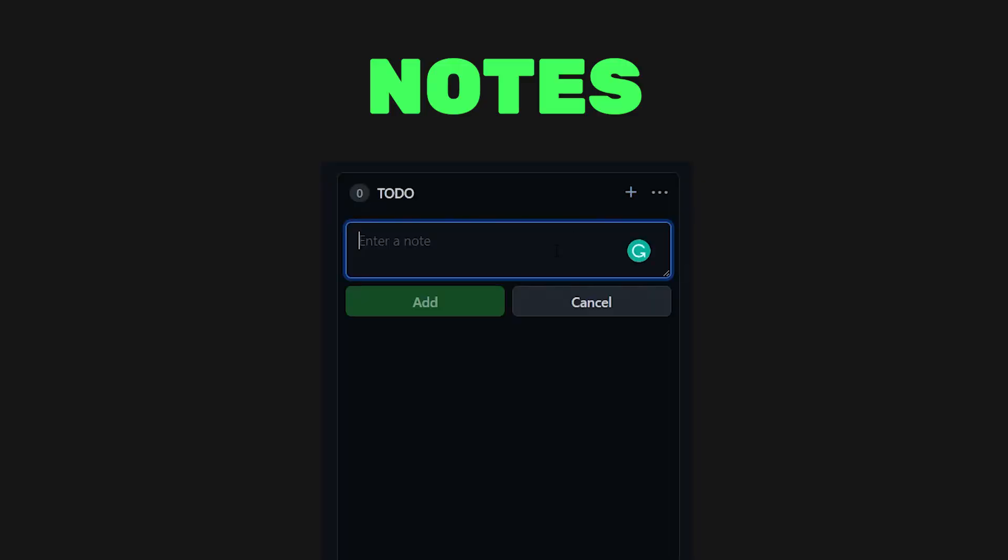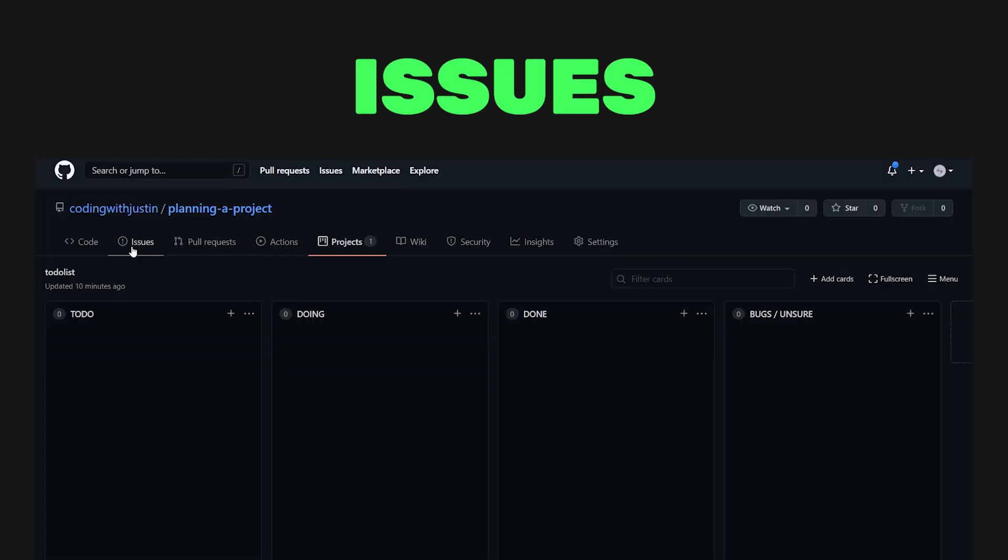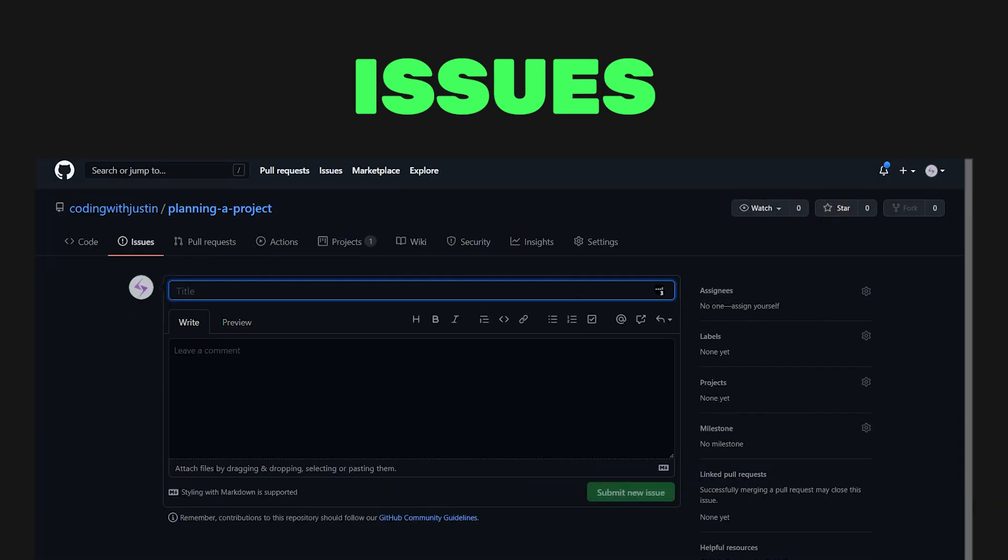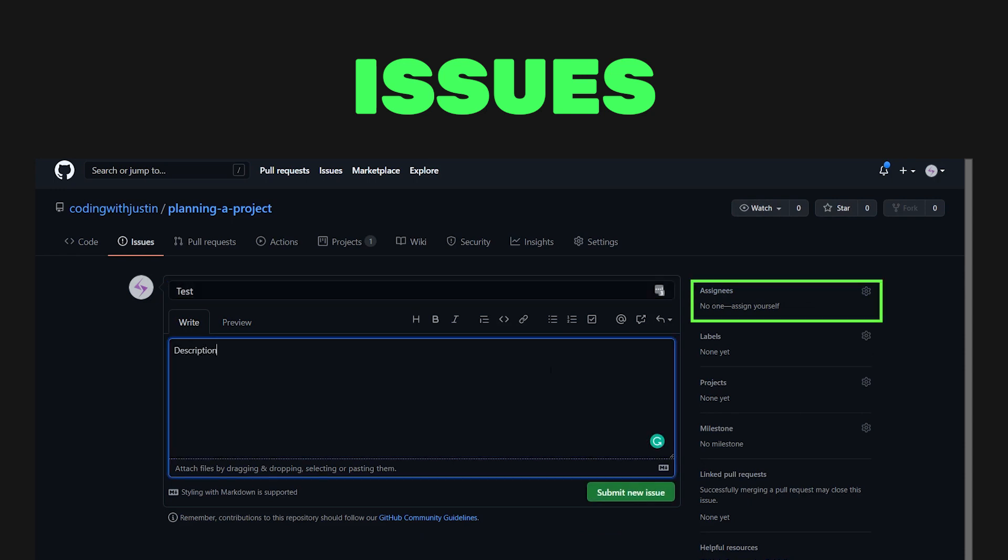Let's continue using the To Do app example to make our component cards. In GitHub, we can create two types of cards. The first is a note, and it generally serves as a task reminder or adds information related to the project. We can also create issues, which provide more features such as labels, assignments, and milestones.